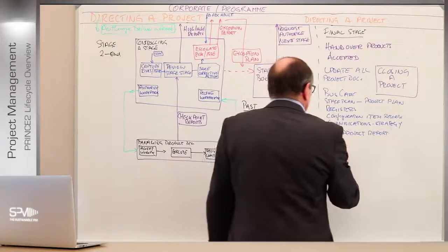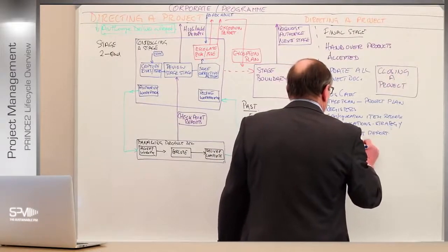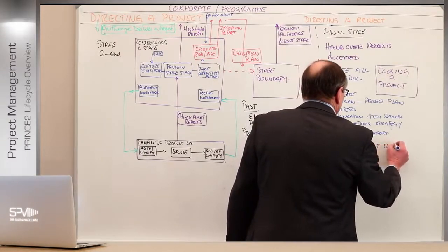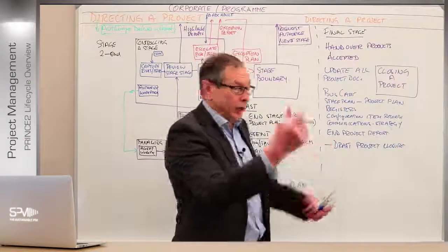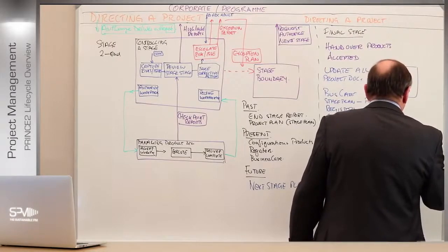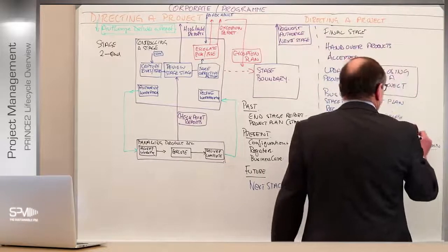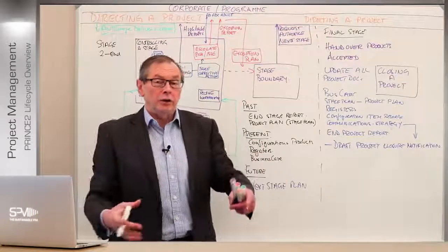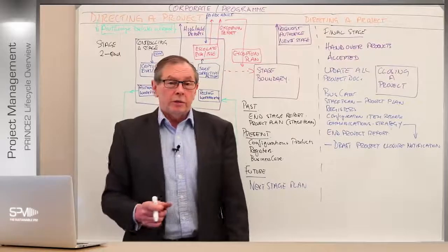And then what the project manager needs to do is to draft up a project closure notification. In other words, really a document that the board are going to sign off, and the PM will end up doing probably the work actually, to send off to everybody, all stakeholders, that the project's closed. That's why you need the configuration management strategy completed at this point, because obviously that has all the numbers and contacts of anybody who's been involved that needs to know at this point in time, right?